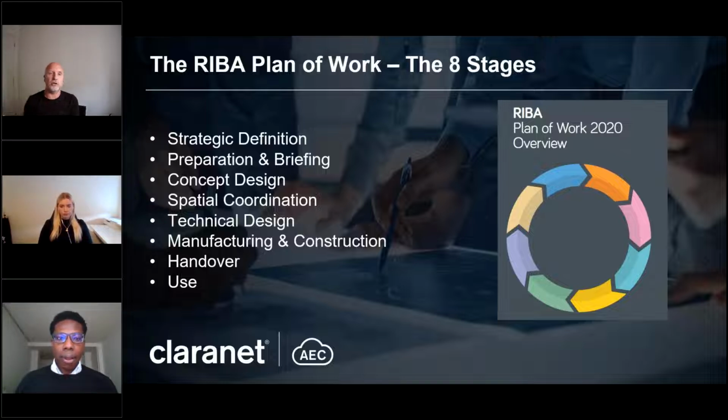And that's when you start to bring on your main contractor, your construction companies, the likes of Kier, the likes of Skanska, the likes of Balfour Beatty, that typically become what's known as the primary main contractor within an entire project. And they will then go off and build out and tender for all of the different subcontractors that will deliver those pieces of work that sit within the technical design, all built out from the spatial coordination and the concept design. And that's when it really gets going. And that's when the Lego bricks start to really pull together.